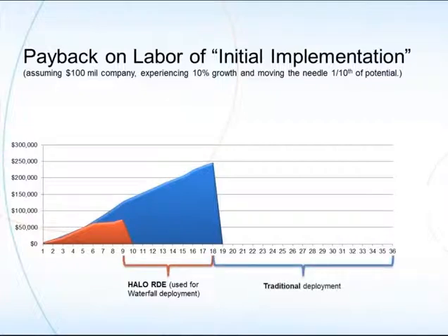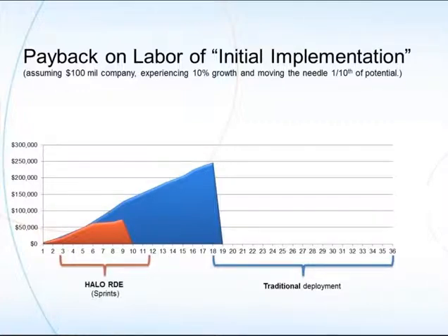When it takes you 18 months to deploy it, your payback is much longer. In this particular case, it would take you 36 months to pay back your initial investment. And that's what traditionally people are finding. But if you use an agile method to do the implementation, the payback happens much sooner, and essentially, if you work very effectively, you could possibly pay back the investment that you have in the BI project by the time the full thing was implemented.